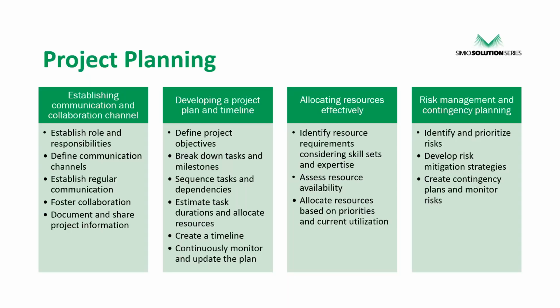As well as you start to get into maybe more of the final stages of the product and you're looking down the timeline, maybe there's a secondary engineer involved that you deploy or you delegate different modeling tasks to as the lead modeler. And then you start to understand, okay, well, if I need to schedule these check-ins with maybe my leadership as the stakeholders, then I maybe need to schedule that pretty far out in advance, right? Because we all know their calendars fill up quick. So just having that plan early to work against and schedule against can be really helpful when getting the resources you need, aligned to that plan.